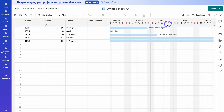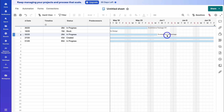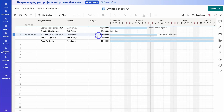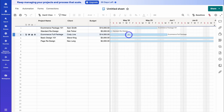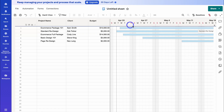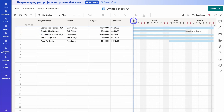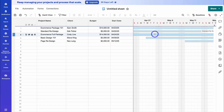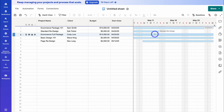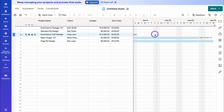We can still see our columns by scrolling across, and we can also see a visual representation of our timeline. Here we have the dates displayed above and we can see our different projects — for example, eCommerce Full Package. You can see that project as a bar on the Gantt chart with the days shown above. That's how we add a Gantt view to visually see our project, task, or item timelines.